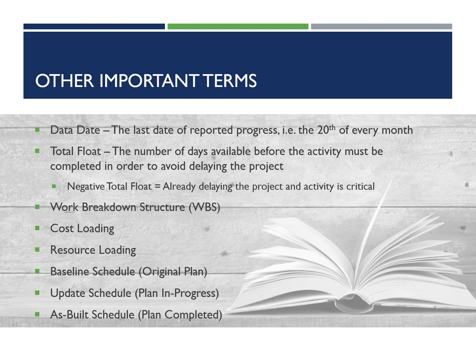Now, just because your particular activity has float doesn't mean there is no sense of urgency to get it complete, because there are still activities that need to be finished after yours is done. If you are absorbing that total float, then you're making it unavailable to other activities that are downstream.